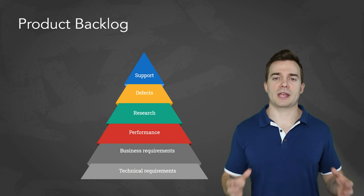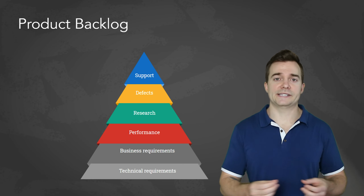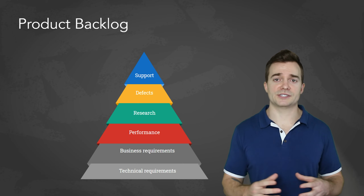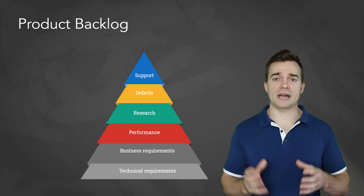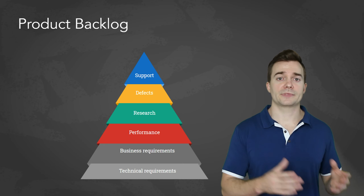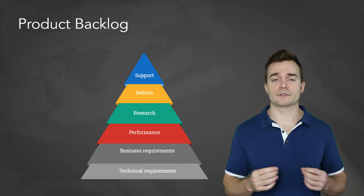Therefore, an associate product manager has to help the product owner in backlog refinement. It's a process through which the product owner and some or all of the rest of the team review items on the backlog to ensure the backlog contains appropriate items, that they are prioritized, and that the items at the top of the backlog are ready for delivery.